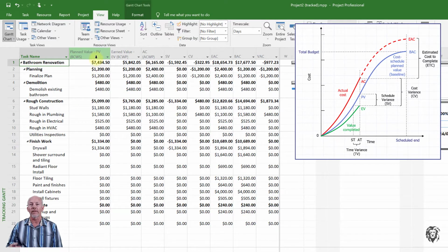And so the time comes from its association to the specific task and when the task was actually completed. Now, remember in our resource sheet, we also told the program whether to prorate the accumulation of those expenses or to track them at the start or the finish of the specific task. And so that's all going to affect how that data is accumulated when we looked at earned value. So let's look at the first one.